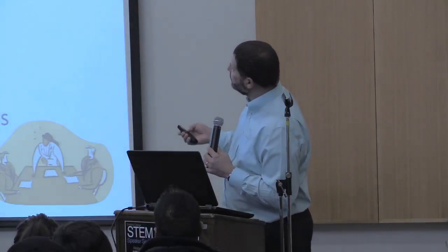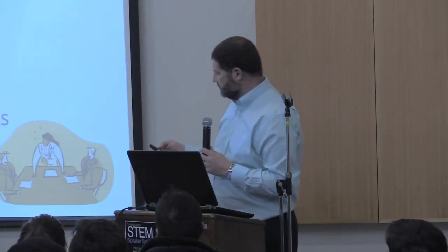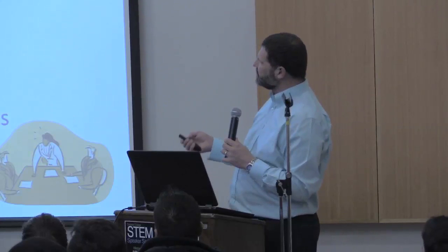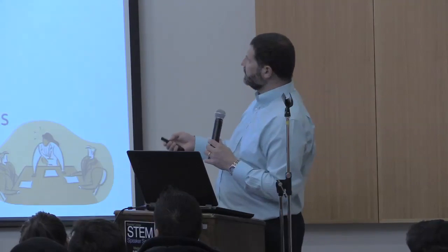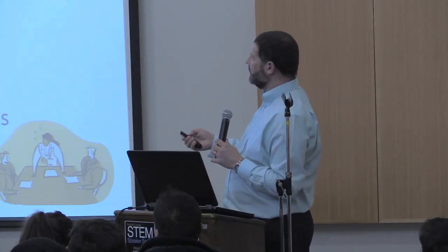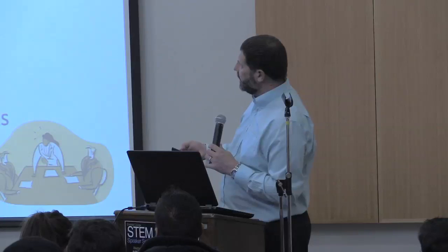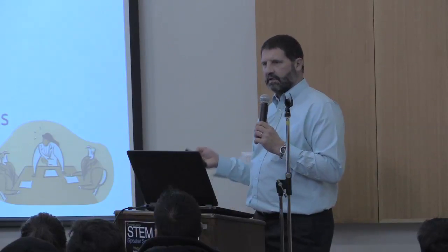All right, so special case meetings. I think we're doing good on time. Special case meetings would be like schedule meetings, where if you want to recommit, or when we're looking at the schedule, we can do three things. We can recommit, or we can renegotiate, or we can just unmake the schedule, and we're not going to do it. There are different problem-solving techniques that are employed in the industry.